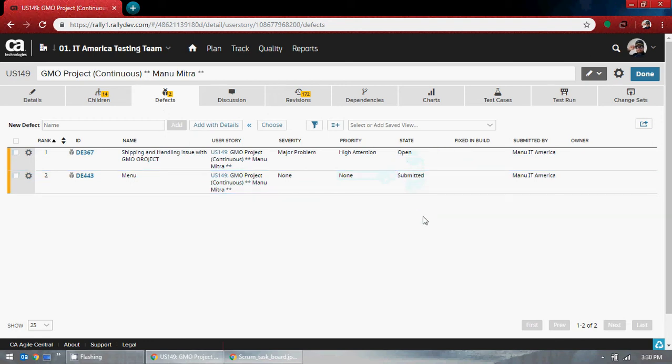The state is open. That was my hunch, my sense — that once you have open defects, you cannot technically move that into completed status. Because you cannot say the requirement is completed until this defect is fixed.